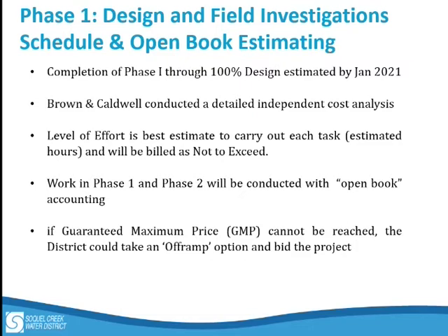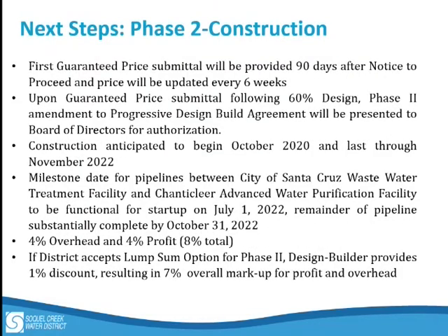And I should mention that they are going to give us a price in 90 days after getting started. That's of course going to be based on what they know now, or after 90 days of getting into it. So they'll still need to refine the price, and as design gets more refined, the price will be more refined.